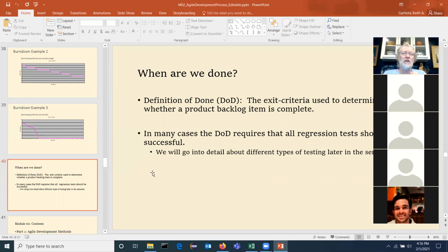Usually, you're going to have an initial meeting where you say, okay, these are the project requirements, not requirement specifications. I'm going to make that distinction in those terms this semester. The requirements are just generalized. This is what the product has to do. You try to capture as many of those as you can up front, and then you start doing user stories from those. Okay, as a programmer, I want to blank so I can perform testing. As a user, I want to do such and such.